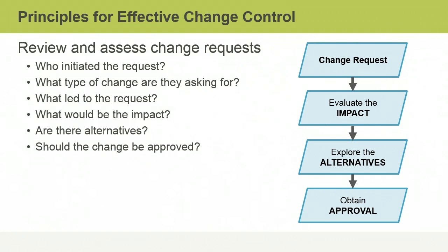When reviewing a change request, you need to determine who initiated the request and what type of change it asks for. You also need to understand the factors that have led to the request. These may be customer demands, changes in legislation, technical difficulties, and so on. You need to assess what impact the change could have on scope, quality, schedule, and cost. Suppose the change you're considering pushes out the scheduled completion date. That means you'll need resources longer than expected, and this will cost the customer more.